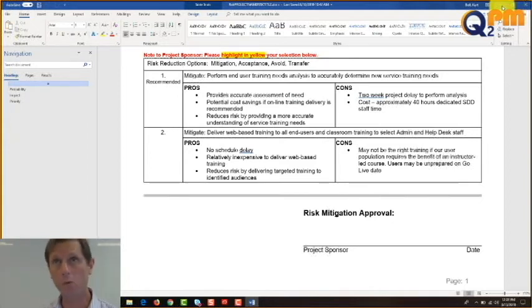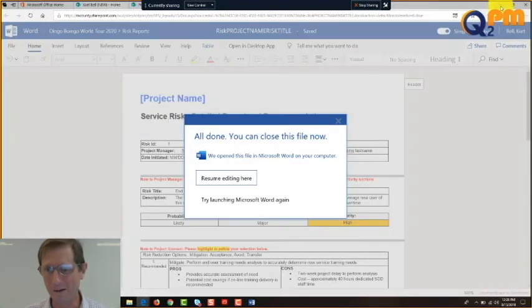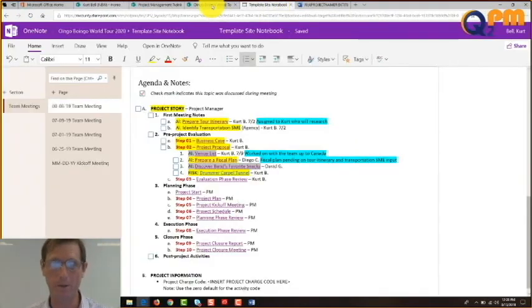Because when that risk, okay, let's imagine we're 6 months into this band and they chose to accept the risk, right? And we're 6 months into this thing and the drummer's carpal tunnel flares up mid-concert, he can't play anymore, we don't have a backup, tour dates, he says, I give up, I quit, I'm going home, I'm going back to LA, I'm going back to Malibu, you guys, I'm done, right? They're going to be looking for a paper trail. And you're going to have a paper trail that shows that this risk was communicated and accepted. Can't labor how important that is. Now, it's not a matter of placing blame, it's a matter of accountability.